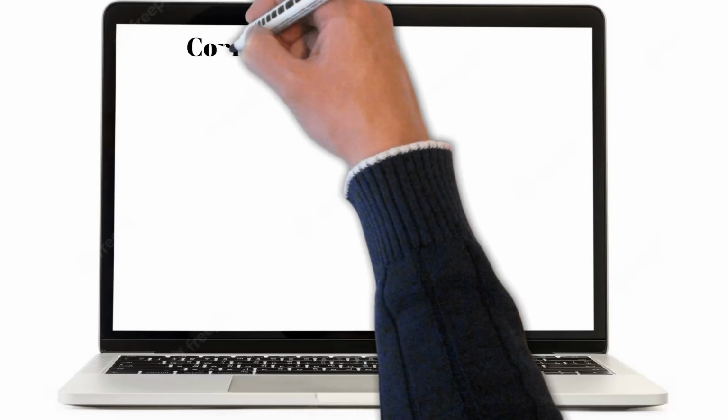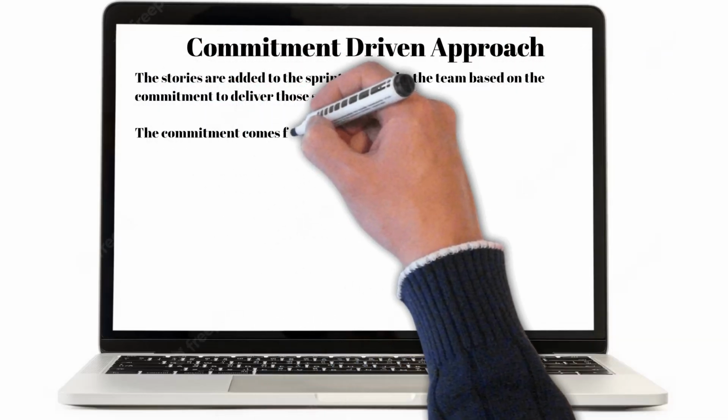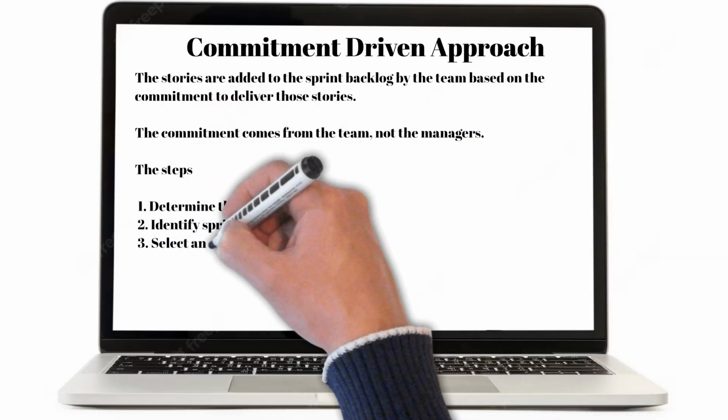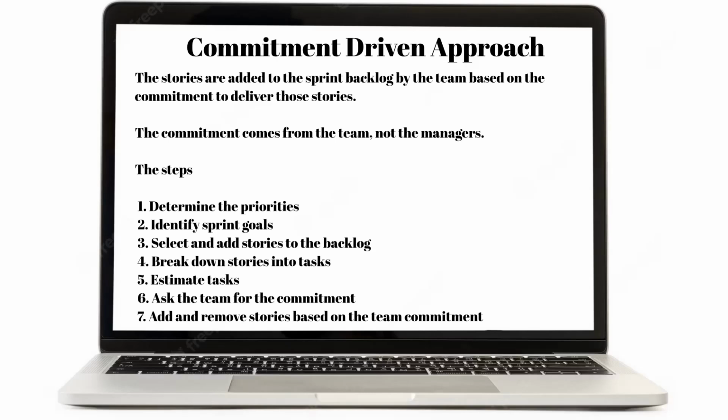Another way to plan a sprint is a commitment-driven approach. This approach has many similarities with the velocity-driven approach. However, the stories are added to the sprint backlog by the team based on the commitment to deliver these stories. The commitment comes from the team, not from the managers.